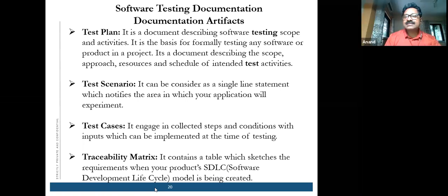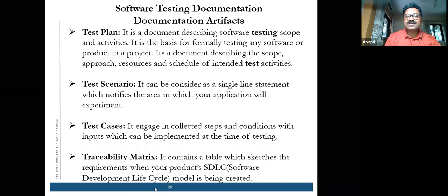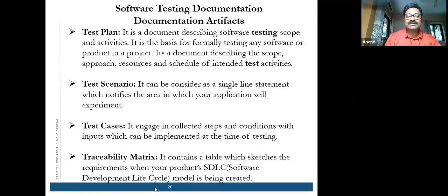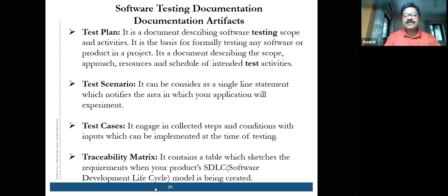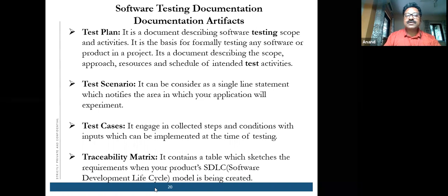Why? Because the effort required to test will be more if we have to cover all the browsers or the leading browsers. Point number one. Second point is they will also expect us to test on Windows as well as on Mac operating system. It has to be compatible with both the operating systems. So then what happens? Our work will be doubled, right? So the scope and the effort will be determined, and we need to mention clearly in the test planning so that the testing team will be aware what needs to be tested and where all we need to test,